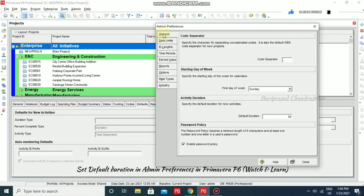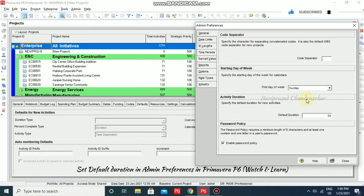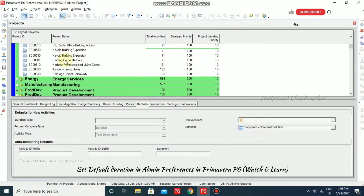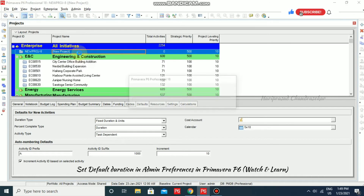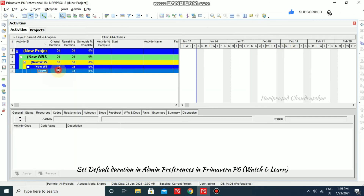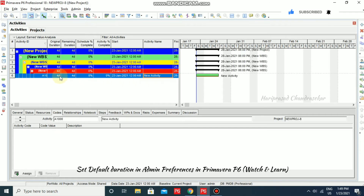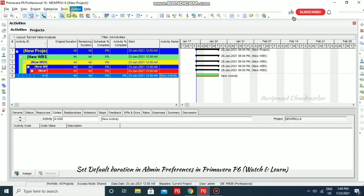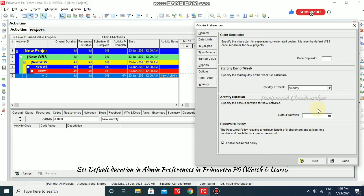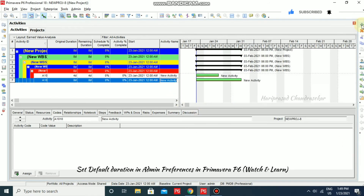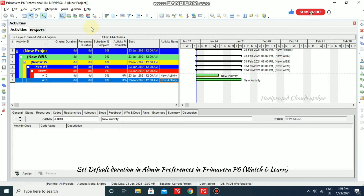Going to Admin Preferences, under Activity Duration, we can specify the default duration for new activities. By default it is set to four days, which is why new activities are getting a default of four days. If you want to change this, you can. For example, setting the default duration to 10 and closing — the activity is showing eight days because of holidays in between.